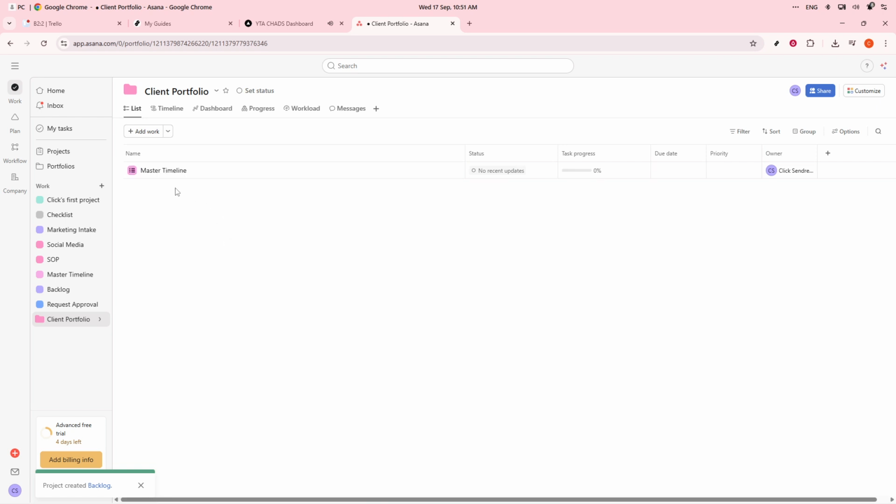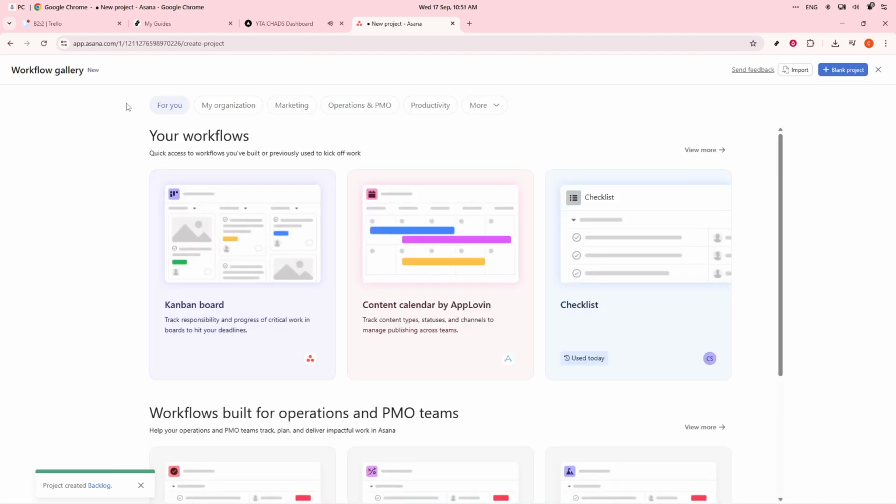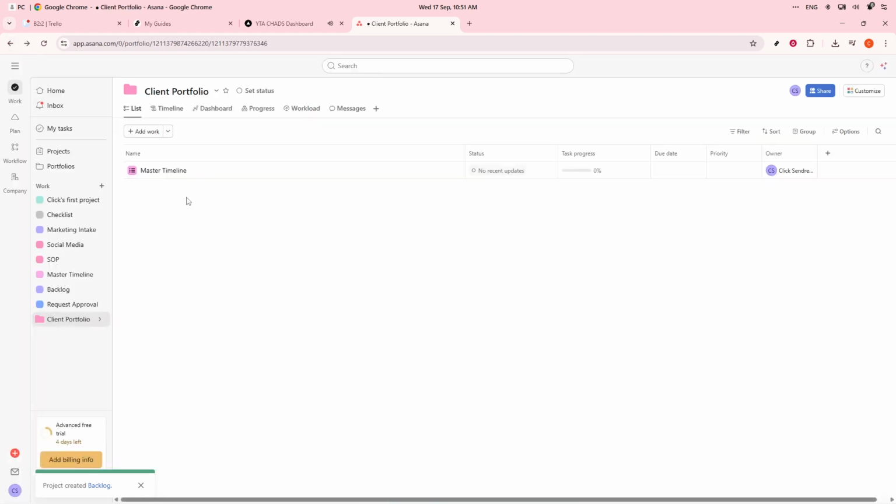To streamline client approvals, leverage the Forms feature to allow clients to submit requests for things like ad creatives or content changes easily. Next, utilize the approval task type, enabling managers or clients to provide feedback such as approve, changes, or reject by automating with rules like when approved, move to scheduled. This automation minimizes email dependencies and keeps everything efficiently organized in a single location.